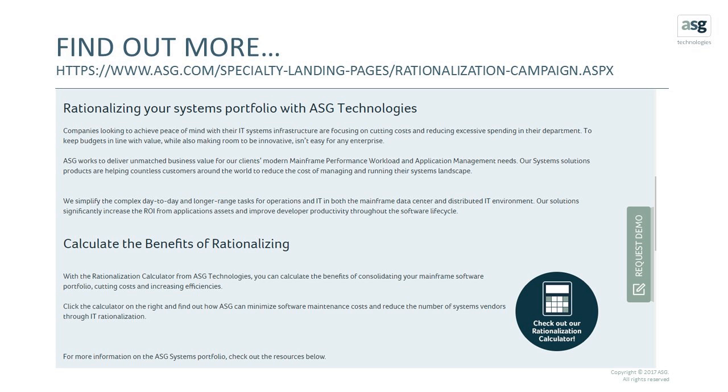The first of the two is to adopt improvements that will address the most critical pain points in your organization. So you'll want to prioritize the rationalization of applications that are the most costly or the most difficult to maintain. And second, ITIL recommends you look for opportunities to boost business productivity with new services and new capabilities. And you may find that by consolidating or integrating existing IT services that you will actually be able to establish new IT services that can be leveraged to boost business performance.